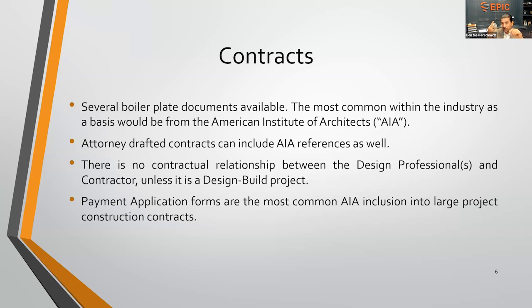element to their three contracts are going to be going with the client or with the owner, with the community association. The only caveat being if it was an actual design build contract, and that would be a scenario where you typically have the designer and the contractor merging together or working together, and then one proposal to the association to accomplish whatever task was given to them. But it's very important to know that.